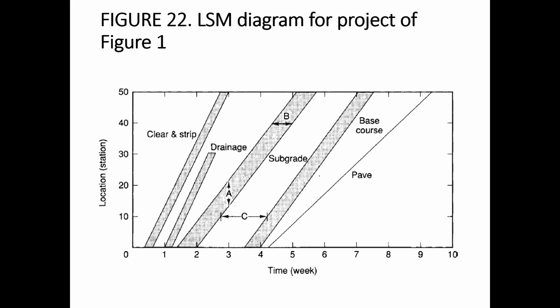Many of those structural components, like formwork, concreting, and reinforcement, will be repeating in every floor. So for that part of the work in building projects, the linear scheduling method can be used, and for highway projects as well.